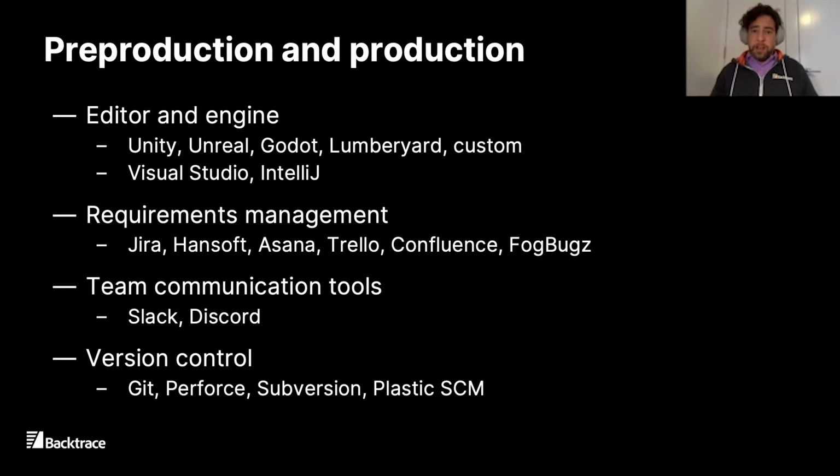But that said, a lot of the common software tools that we've seen, not only in gaming, but other industries, like Asana, Trello, Confluence, FogBugz, Phabricator, there's a number of these issue tracking tools or board management tools, if you will, that people do use for requirements management. And what we've seen is that team size really does dictate. The larger the team, the more structured these tools need to be, where they have more defined required fields, maybe some more information around handoffs between different teams and so on, versus smaller teams where those kinds of complexities aren't needed.